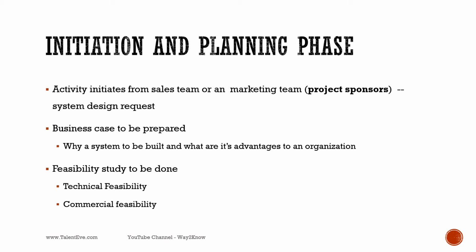These are all the business cases these project sponsors prepare, and with the help of the internal system analyst or whoever, they do a high level feasibility study, from the technical and commercial perspective. Technical is whether we have the capability, or do we need to invest more. Whereas from the commercial side, whether the company has sufficient funds, or whether the company will get revenues beyond the investment, so that it lands in profit. So this kind of feasibility study needs to be done.